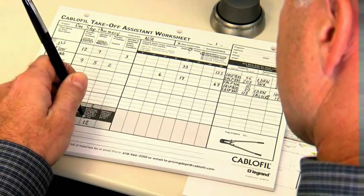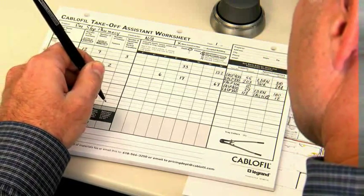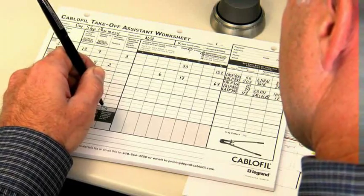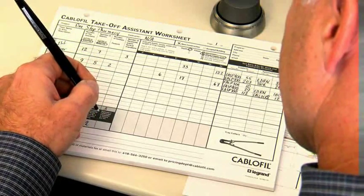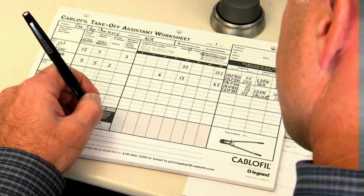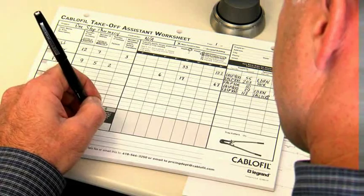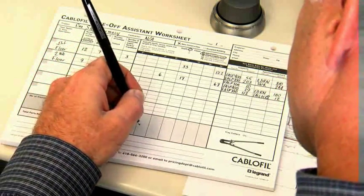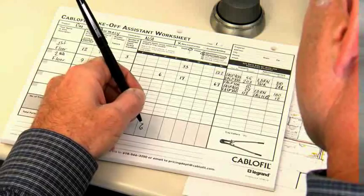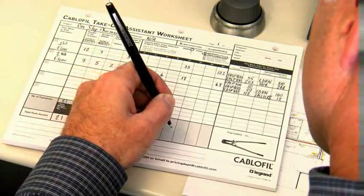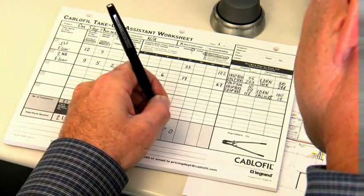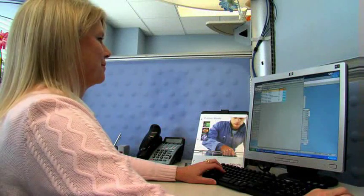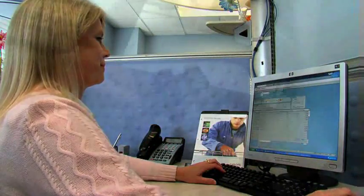Next, based on total footage of tray, calculate the total number of splices needed. At the bottom of the worksheet, determine the total number of EZT-90s you will need by totaling the number of transitions you have listed above. Finally, calculate the total footage for each tray size and enter it at the bottom of the form. You have now completed a bill of material.